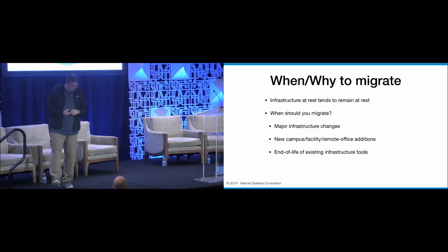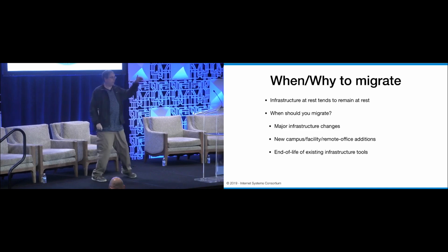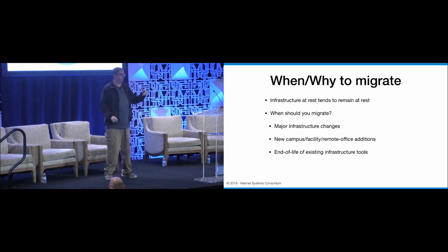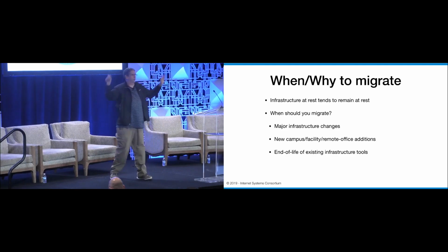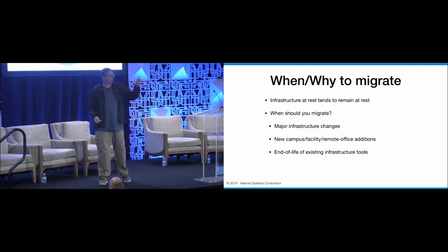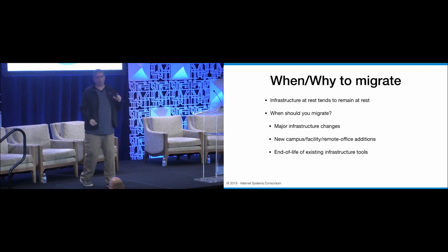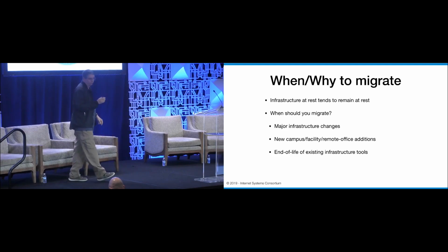End of life of existing infrastructure tools. How many of you are dealing with a vendor or vendors that have said, well, yeah, you have about 2 years to get off of this existing platform that you're using? Have any of you ever had to deal with that? That's no fun. And I'll tell you, if they tell you 2 years out, it's probably going to end up being more like 4, because everybody's going to be screaming when there's 3 months left going, but you can't turn it off. But I'll tell you, when they start giving you 2 years, it's time to start thinking and moving forward to the next platform.